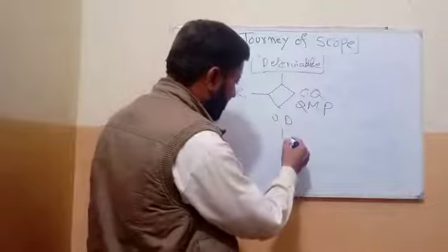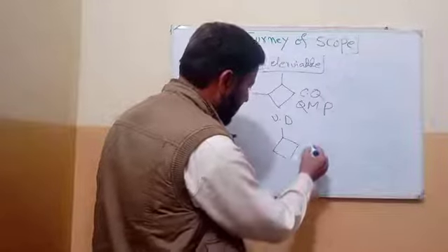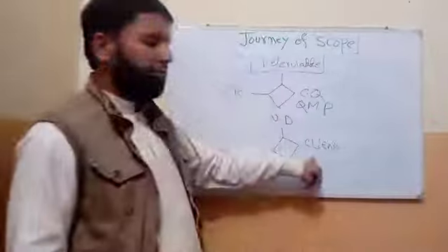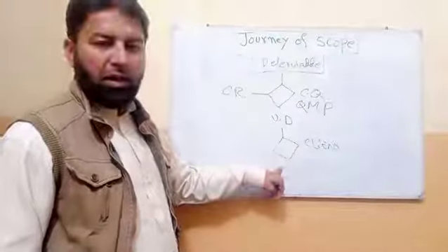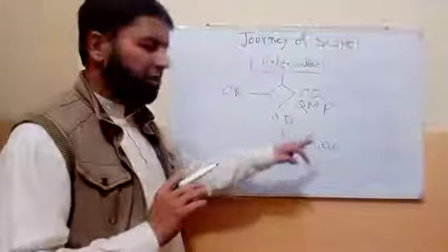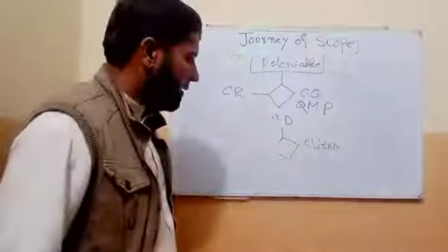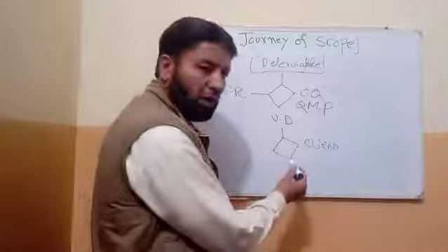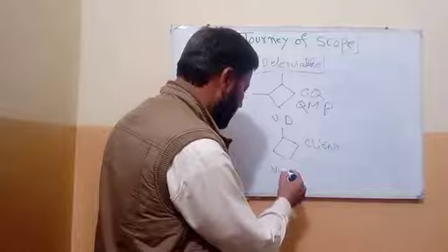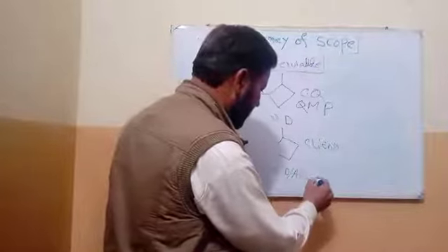The verified deliverable moves to Validate Scope. Here the client will inspect the deliverable according to the scope baseline, and if they say it is okay, then we get a validated or accepted deliverable.